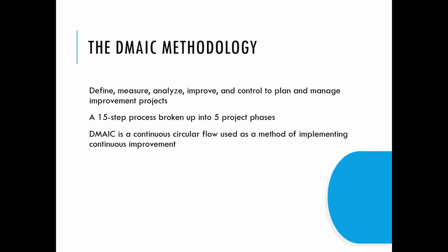Then we have the assuring quality. In controlling, we are allowing error to happen and find the error as variance. In controlling quality, we are trying to catch the defects or the anomalies. But in assurance, we don't let the error to happen. We keep a mechanism to assure that defects do not happen. You might have heard about Poka-yoke. The output of assuring quality phase is quality assurance plan. After that, we have delivering quality.